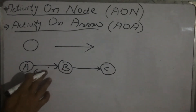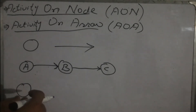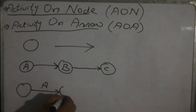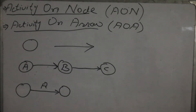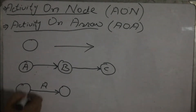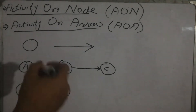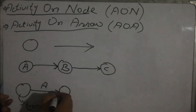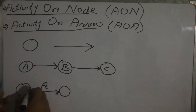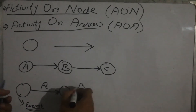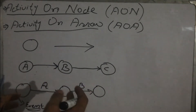In the Activity on Arrow technique, the activity is represented by the arrow. We start from one node, the arrow represents activity A, and we end at another node. The node in this case represents just a small event that does not consume any time or resources — it is just a moment representing either the start or end of an activity. The arrowhead represents the end of the activity, and the tail represents the start.